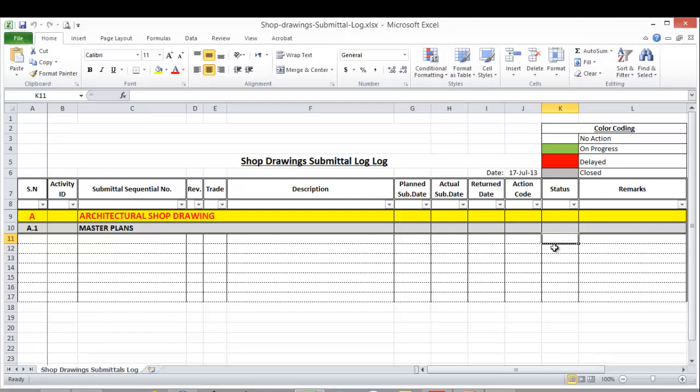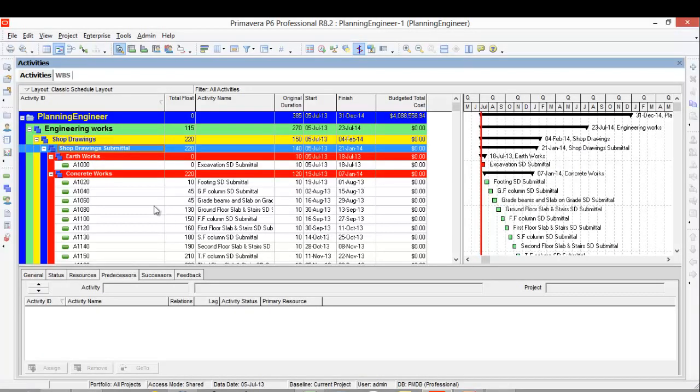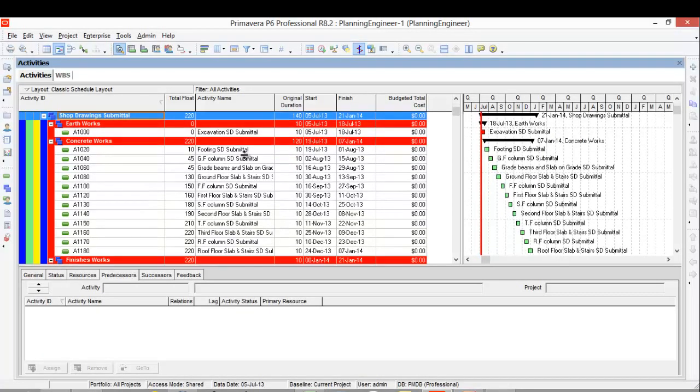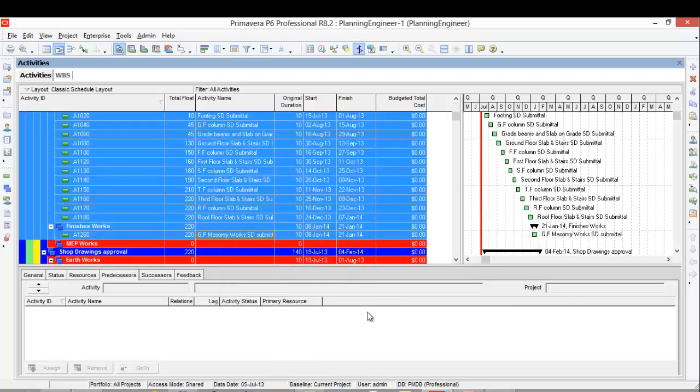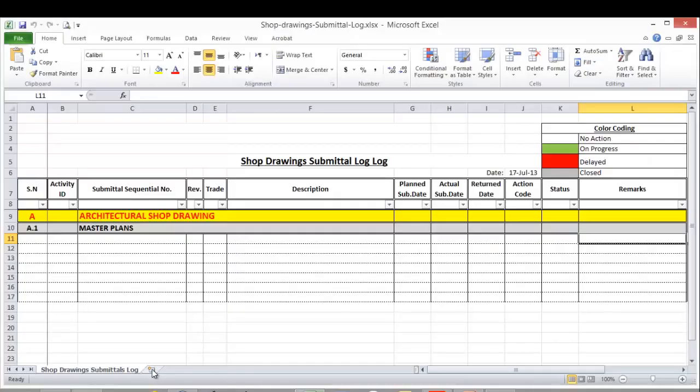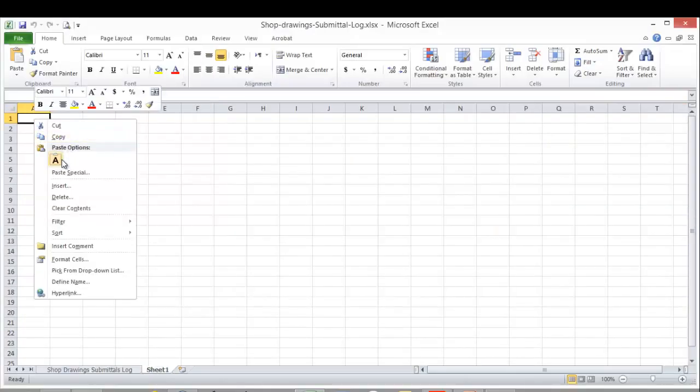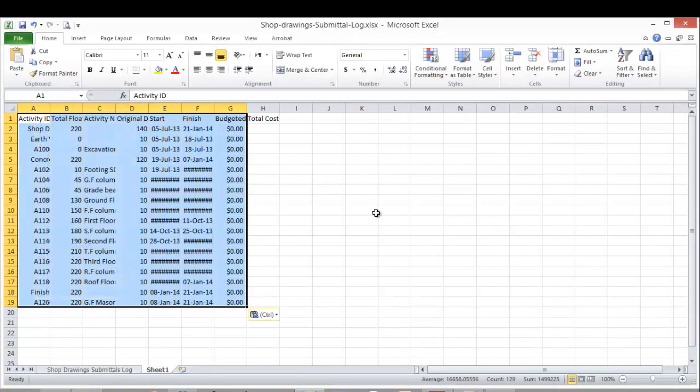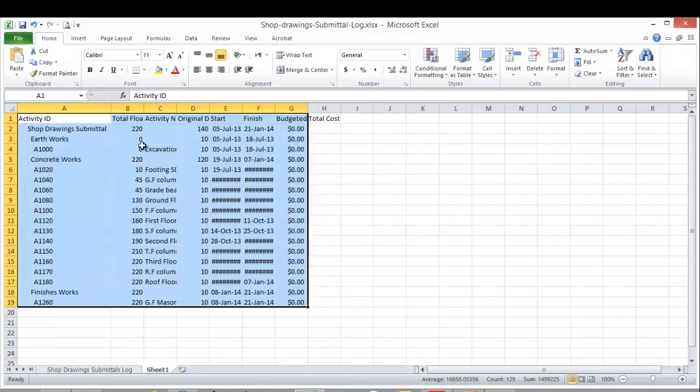So let's go to our Primavera file. This is the shop drawing section in our Primavera. I'm going to select the shop drawing submittal, copy it, then make a new sheet in Excel - a new workbook.